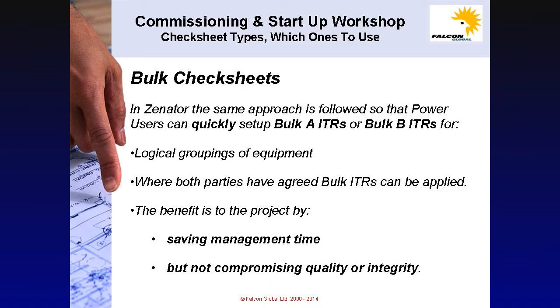In Xenitor, the same approach is followed so that power users can quickly set up bulk AITRs or bulk BITRs for logical groupings of equipment, where both parties have agreed bulk ITRs can be applied. The benefit is to the project by saving management time, but not compromising quality or integrity.